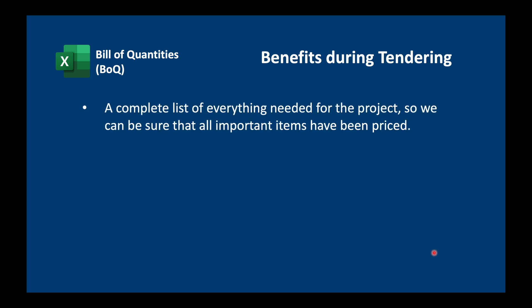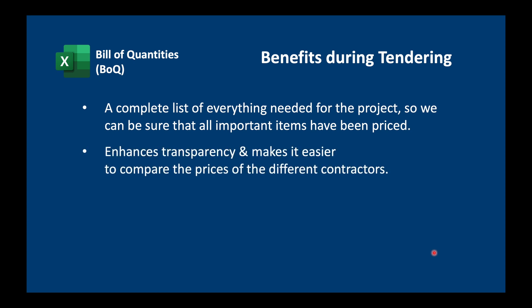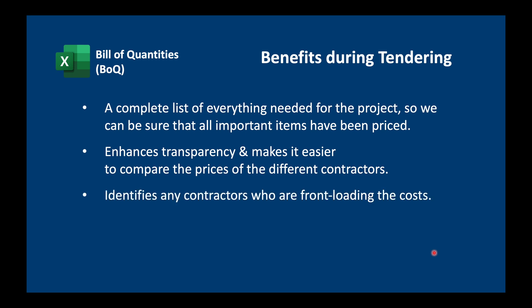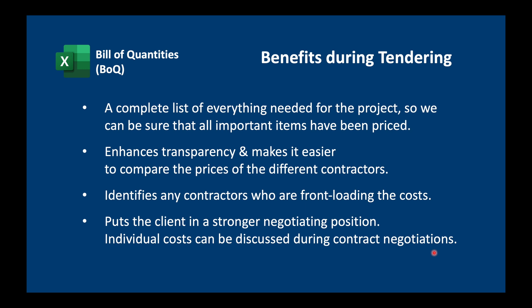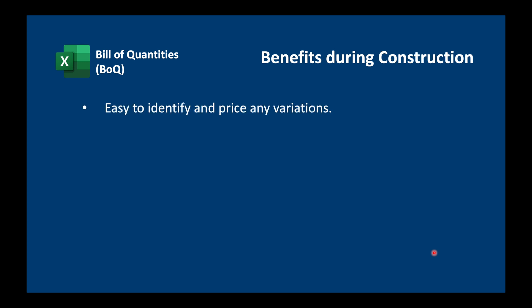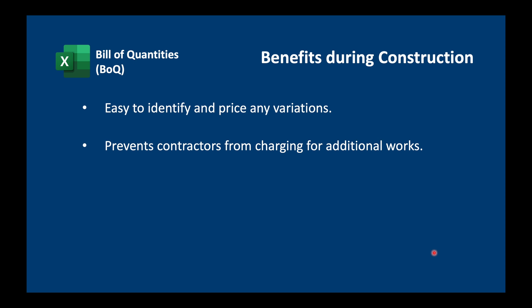During tendering, one of the main benefits of the BOQ is that we have a complete list of everything needed for the project, so we can be sure all important items have been priced. It enhances transparency and makes it easier to compare prices from different contractors. We can also identify contractors who are front-loading costs — for example, charging a lot for mobilization with very low rates for everything else, meaning they could mobilize, then demobilize without completing the project and still get paid. The BOQ puts us in a strong negotiating position to discuss individual costs during contract negotiations.